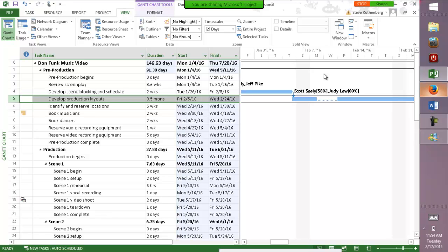Now, I'll just add, because we're pretty much done, splitting tasks is something that Microsoft Project will do automatically if you ask it to level over allocations. And that simply means that you tell Microsoft Project that you want any task that has too many people or too many hours allocated to it for a given person, you want to essentially repack the grocery bag so that everything fits better.